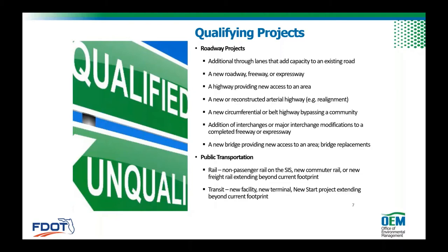And in many cases, we actually provide federal agency dollars to our state and federal partners to provide expedited review on our projects. One of the things when ETDM was first started was, yes, we need to have folks engaged early so they can help us shape the project rather than tell us about all the changes that need to happen when we're ready to ask for a permit.